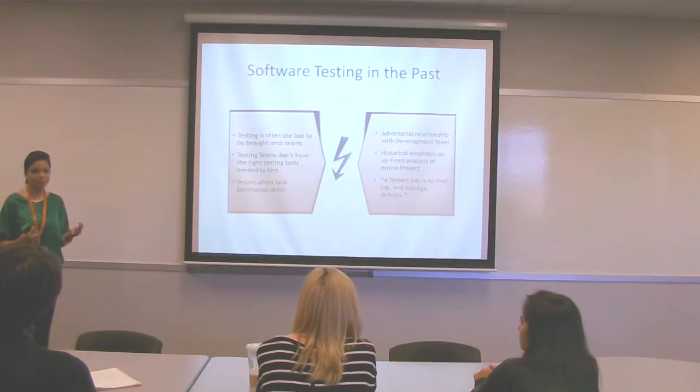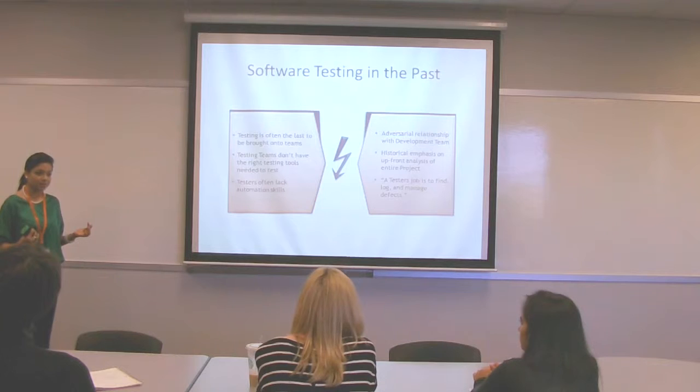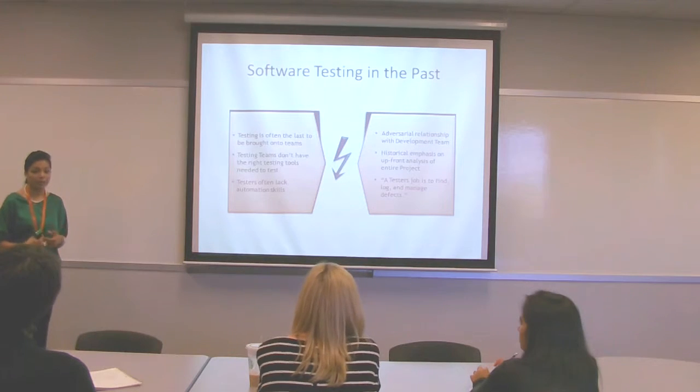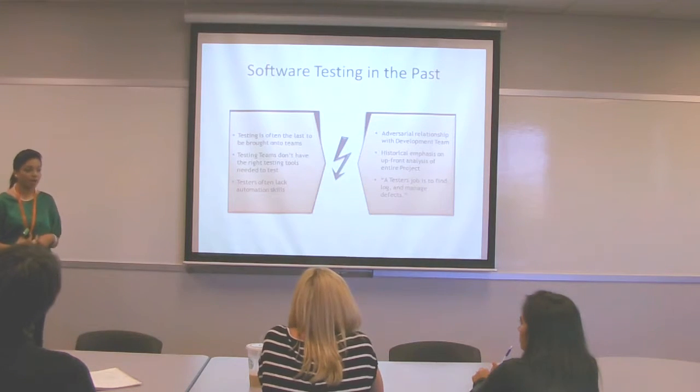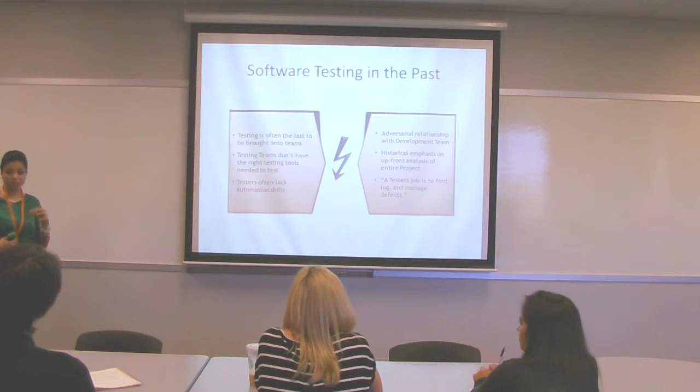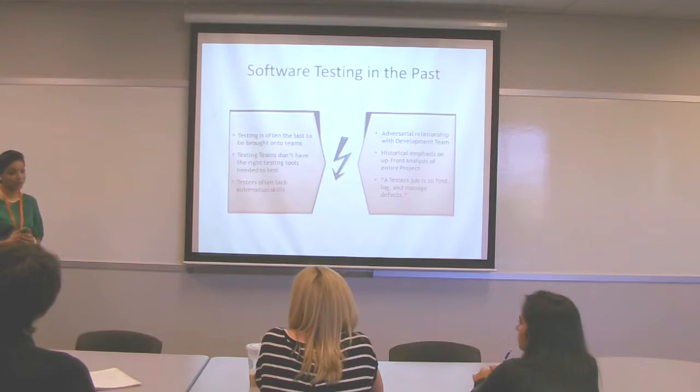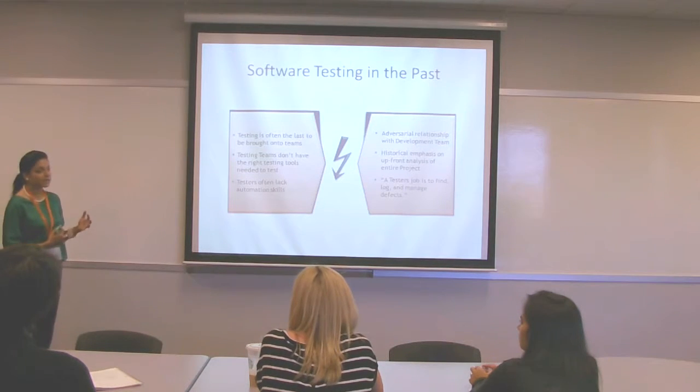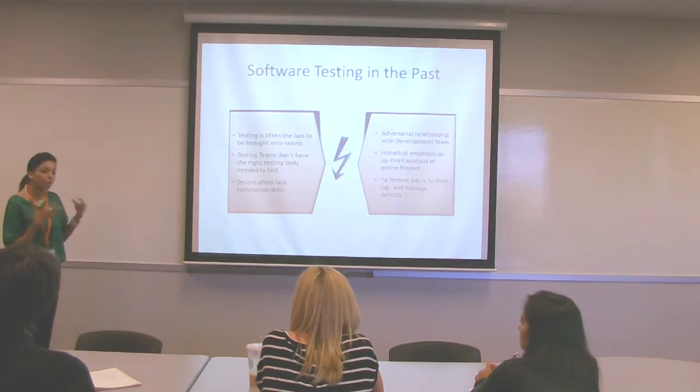If they're 0, it means I'm ready to do my work as a tester. So I don't have to wait for 3 stories to be delivered to me, or for a certain time that the build will happen. Now, there are many things that come with this, that is, builds need to be automated. So there has to be some process to support Agile.